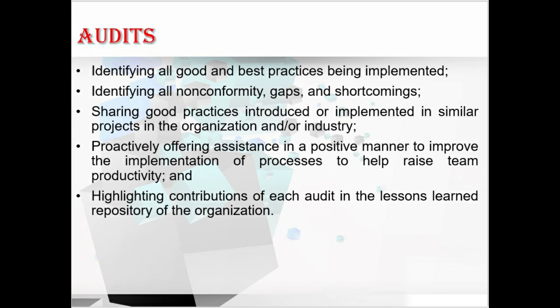The key objectives of audits are: identifying all good and best practices being implemented; identifying all non-conformities, gaps, and shortcomings; sharing good practices introduced or implemented in similar projects in the organization or industry; proactively offering assistance in a positive manner to improve the implementation of processes and help raise team productivity; and highlighting the contribution of each audit in the lessons learned register of the organization.